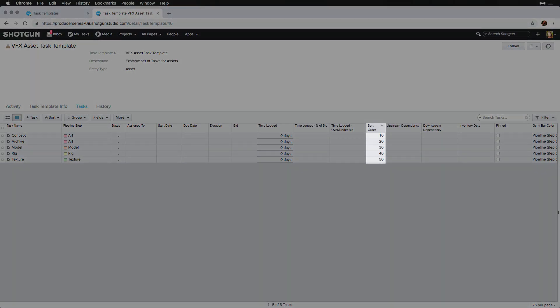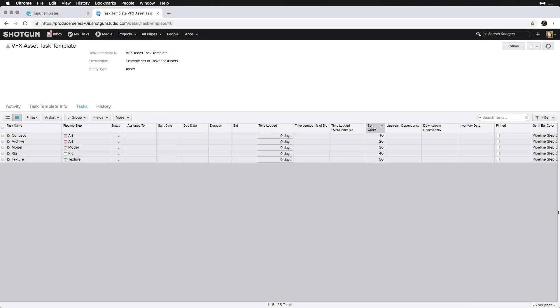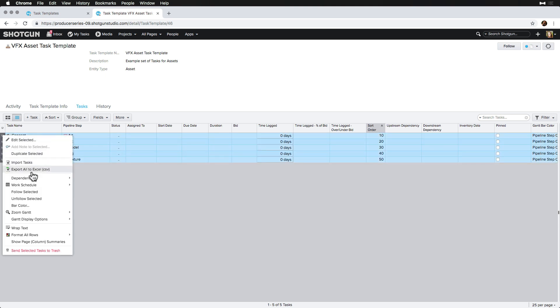The sort order will help me sort tasks easily in the task template, so we can apply upstream and downstream dependencies. To apply upstream dependencies, we make sure tasks are sorted in order, and then select all, right click, select dependencies, and link selected.